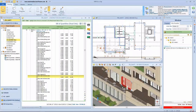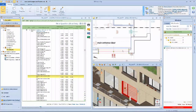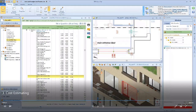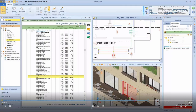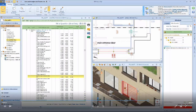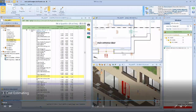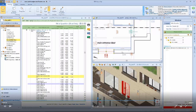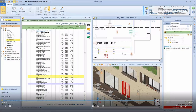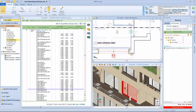This is a very dynamic, unitary approach where we deal with everything involved in the bill of quantities. If we change the size of an object, the bill of quantities will automatically update. As we vary the size of this object in the 3D and 2D view, the price of that object varies automatically. So even if somebody else deals with modelling and makes variations, because it's already linked to a specific price list item in the bill of quantities environment, the bill of quantities will automatically update with no need to worry about locating where the modification took place.